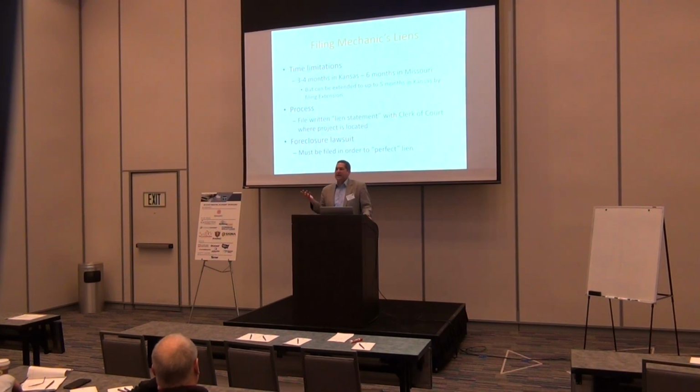But it's short in Kansas. It's basically 3 months for a subcontractor, 4 months if you have a contract with the owner. So you could be a trade and have a contract with the owner, you get 4 months. You can then get it extended to 5 months. Missouri is 6 months. So it's a little bit longer time.